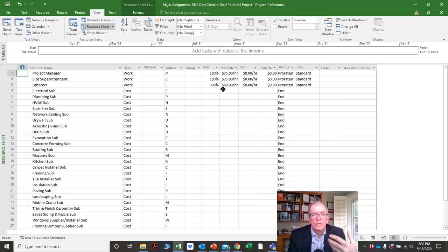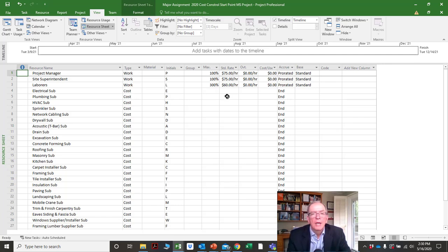That includes your WSIB or whatever safety compensation your state or province requires, government taxes, withholdings, and a number of other factors that add on to the rate.